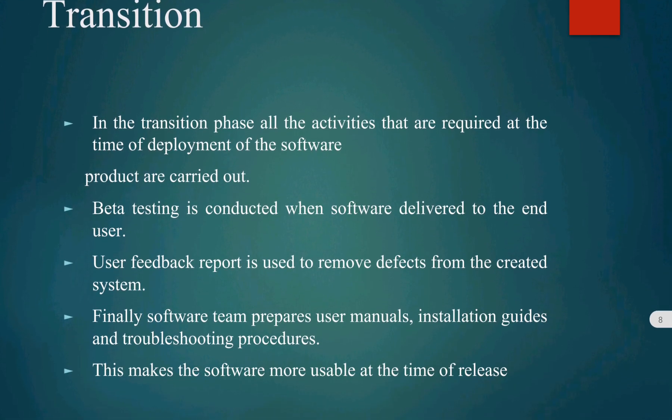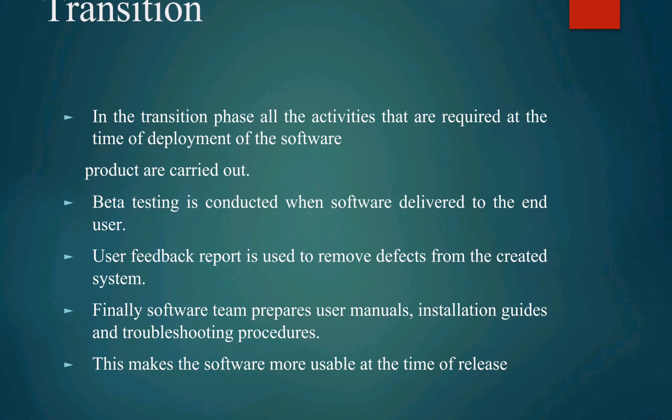The next phase is the transition phase. All the activities required at the time of deployment of the software product are carried out. Transition is nothing but delivering the product to the customer. During delivery, beta testing is conducted when the software is delivered to the end user. User feedback is collected, and based on that, all the defects are removed from the system. Finally, the software team prepares a user manual, installation guides, and troubleshooting procedures, making the software more usable at the time of release.